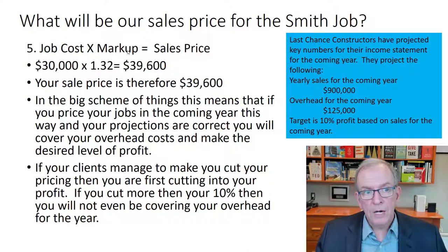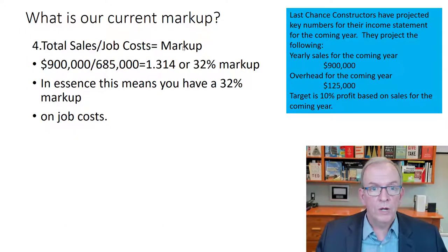So in a project like the Smith residence, right, the markup that we had is including our overhead and profit, and we had allocated for 10% of profit, you really only have $3,960 allocated for profit on this project if we look at this number, right? Because this is how we arrived at it. That's that 32% that we got was based on markup, which is including both of our overhead and profit. It's a multiplier to direct costs.